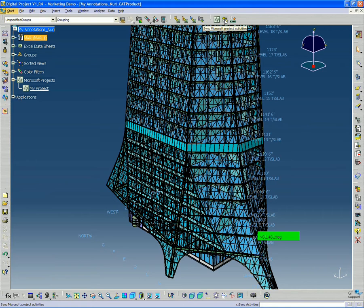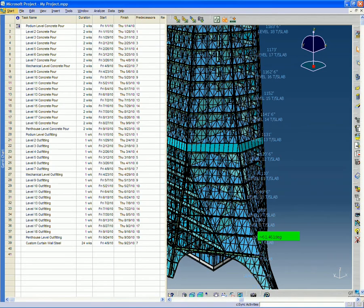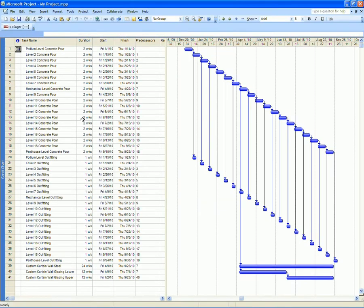So if I click that, it's going to go through, it's going to open up that Microsoft project file. It's going to take the tasks that are found in that file and it's going to populate them inside the model.